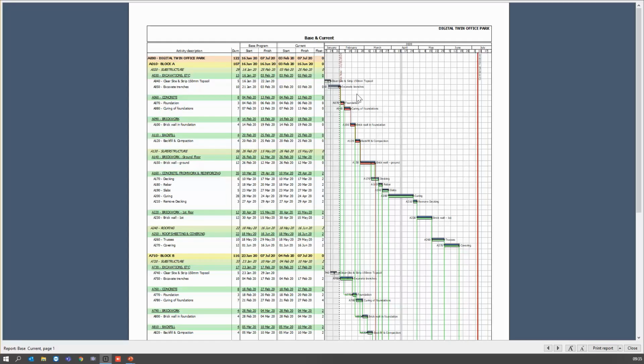And you can obviously see the logic between all the activities clearly. I have also chosen the option to show the base bars, which is why above your red, which are your float colors, red which is critical, green is activities with float, but above all of those bars you have the blue bars indicating that those are your base bars.